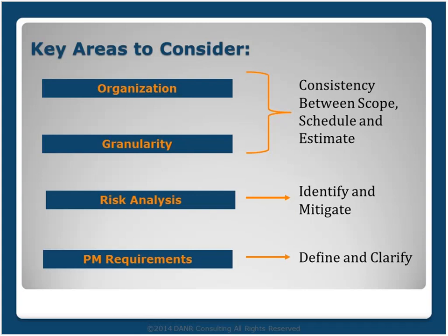There's a lot of various approaches to how you want to do that, and my perspective is a standalone document that calls out the risk in paragraph form, explains what the consequences are, and then talks about how to mitigate them or gives the client options for mitigating them is a great approach. And I guarantee you your clients will appreciate this.